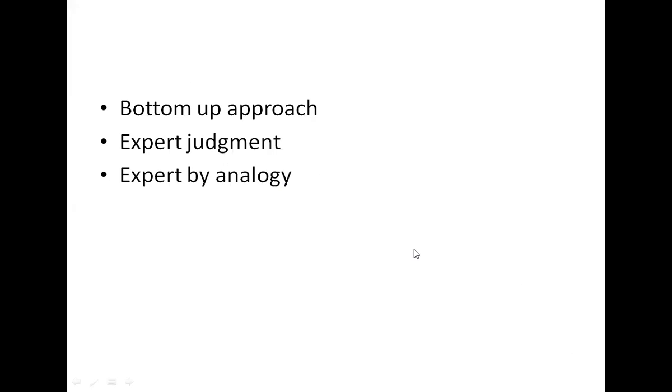Next we move to expert judgment. This asks for an estimation of a task from someone who is knowledgeable about the application or development environment. In this, the estimator would examine the existing code in order to judge what proportion of the code can be derived or not.